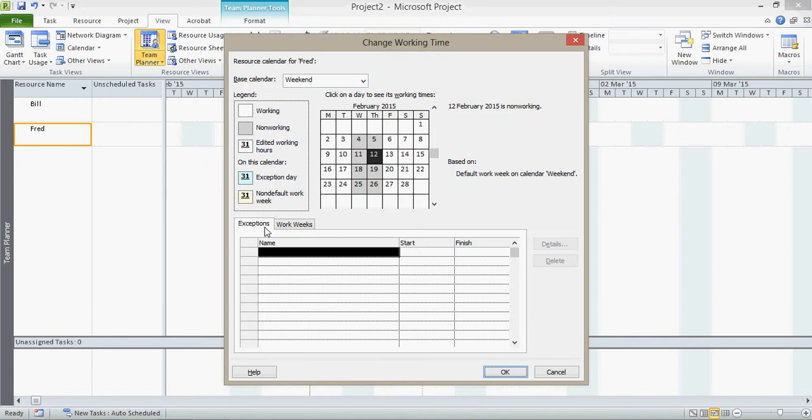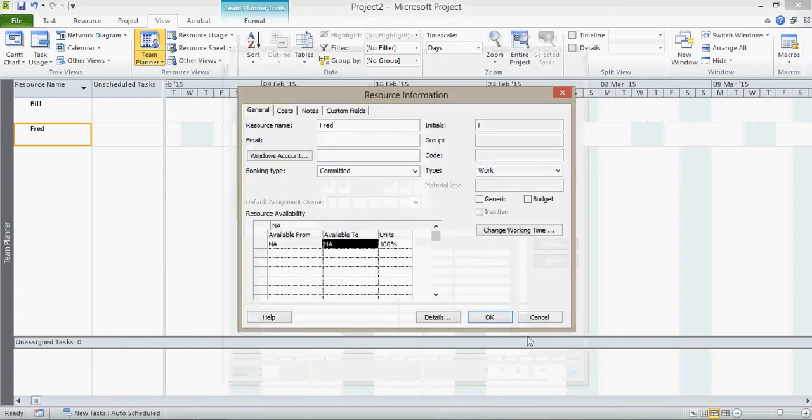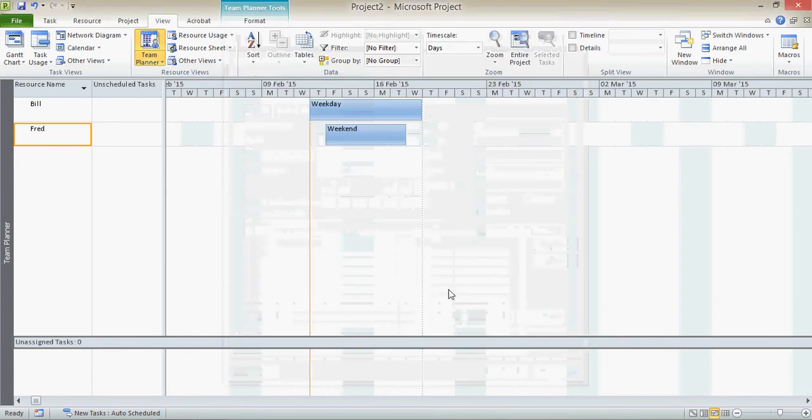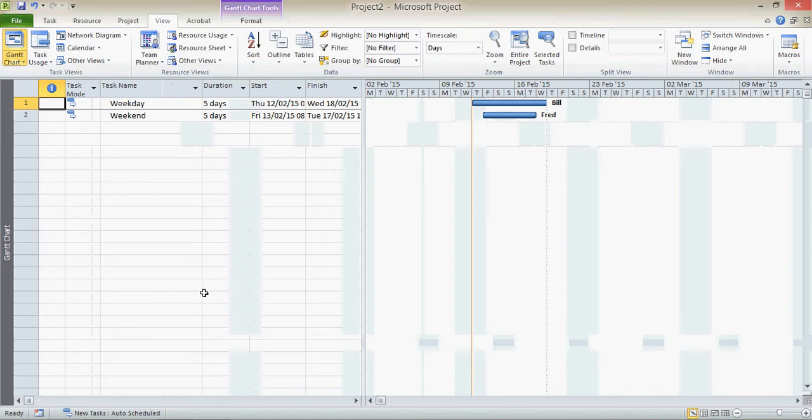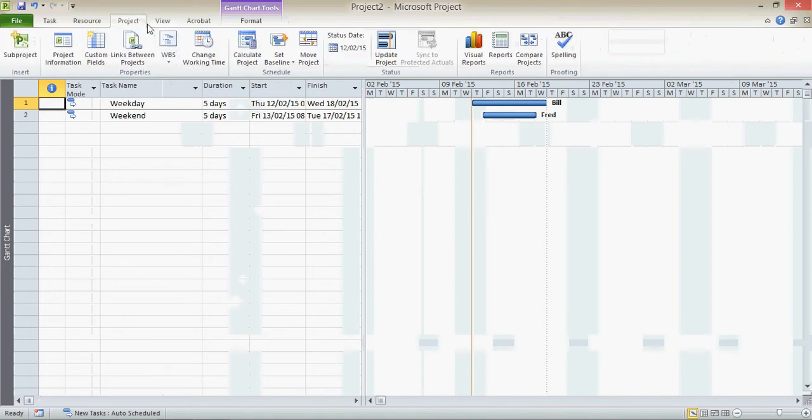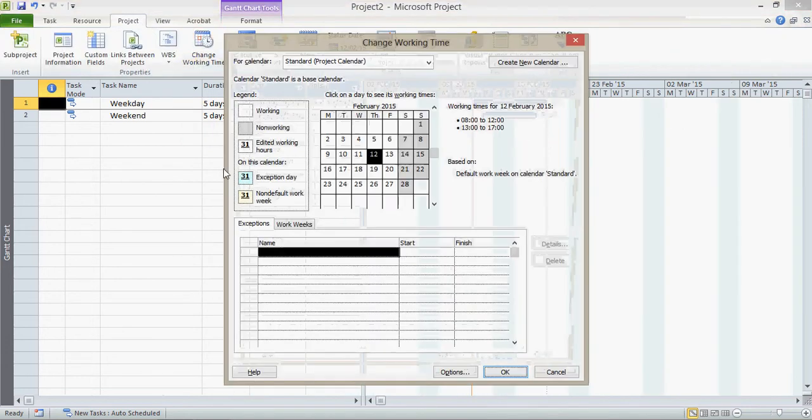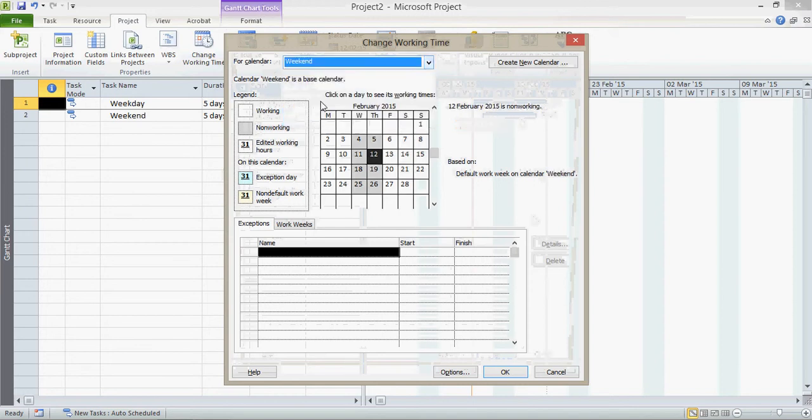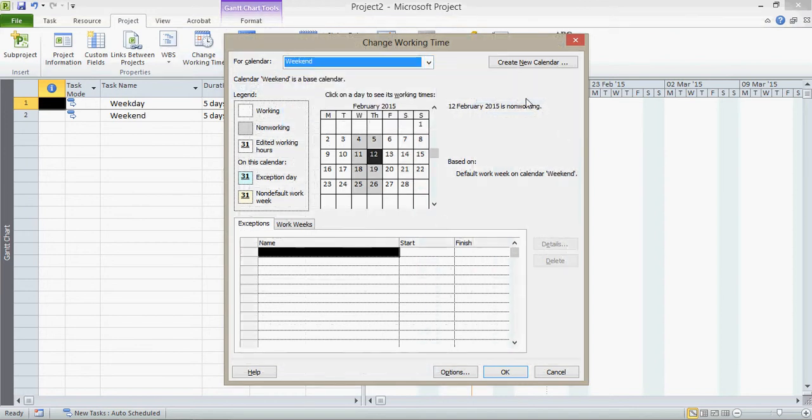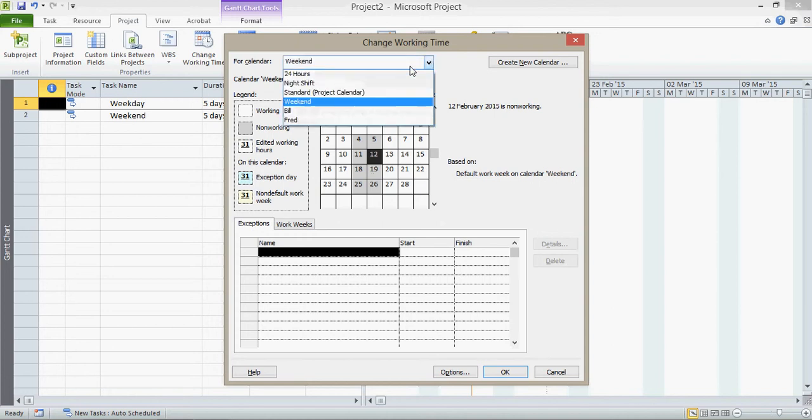So if I now put in an exception, I'm only putting that exception in for Fred, not for everybody else on the weekend calendar. And that's really important. If I get into this from somewhere else, for example, so if I'm on the Gantt chart and I go into the calendars from here and say change the weekend calendar, I'm now changing the calendar for everybody, yep, who's based on the weekend calendar.